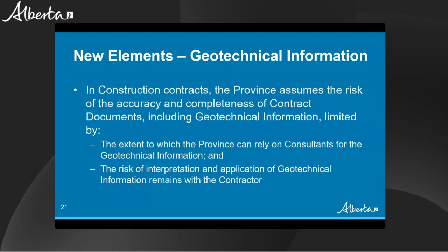Our development methodology led us to the decision to realign the risks associated with the accuracy and completeness of geotechnical information. Both the province and contractors will be entitled to rely on consultants' reporting for accuracy and completeness, including regarding geotechnical information. Consultants are best able to manage the price risk associated with inaccuracies or incompleteness of geotechnical information. The province expects that consultants retained for a project will understand the use to which their reporting will be put and who will be using it, and that the province and the contractors will be relying on it.